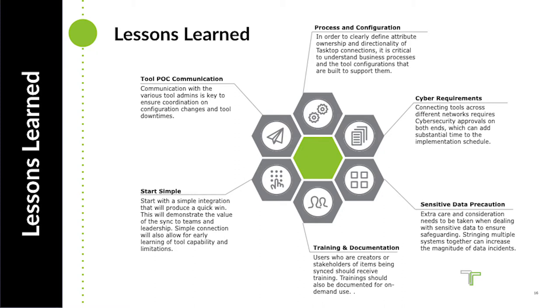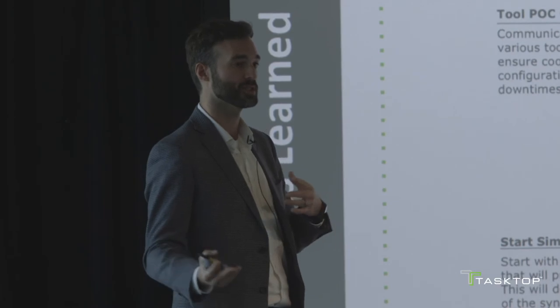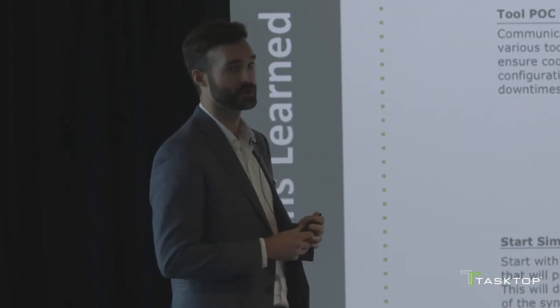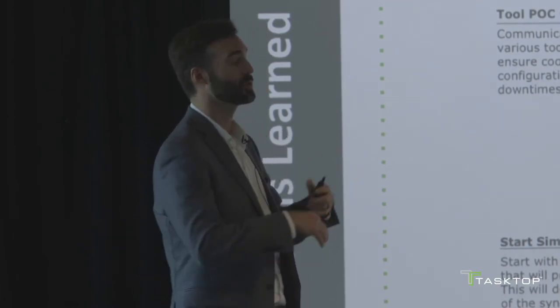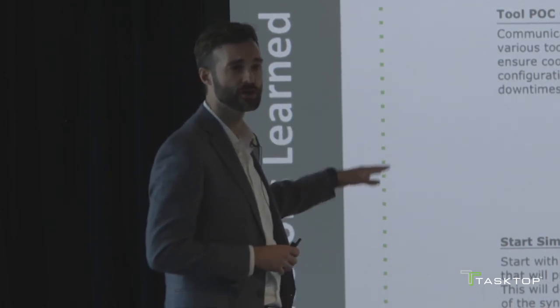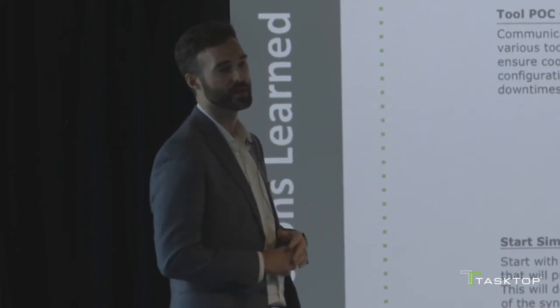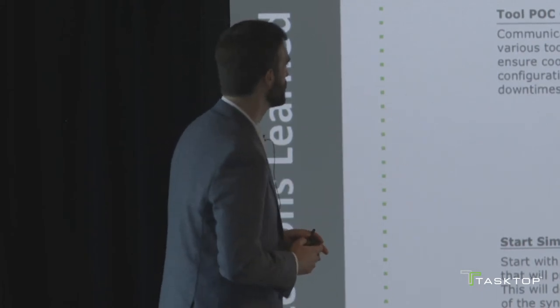And we'll do the same with Integration Hub. But getting that quick win, getting it set up in a sandbox and then doing some sort of small synchronization in a production environment, I think is critical to overall success before you dive into the larger work. And we didn't really cover this, but in some of those diagrams I was showing, we started with just initial requirements flowing back and forth. It wasn't until later that we did the full end-to-end synchronization.